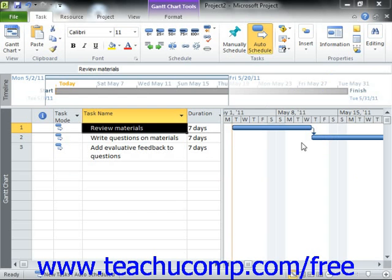Many new users of Microsoft Project accidentally make the mistake of using too many semi-flexible and inflexible constraints when creating their tasks within a project file. This often comes from the urge to set must-finish-on constraints or specify actual finish dates while creating their tasks, which often will produce an inflexible or semi-flexible constraint upon the task.